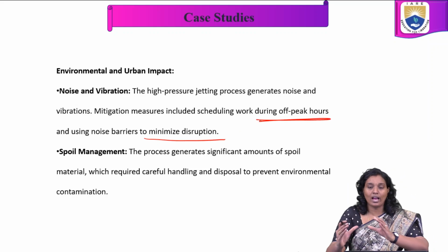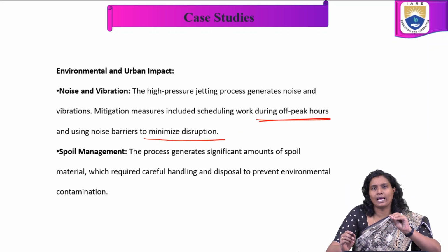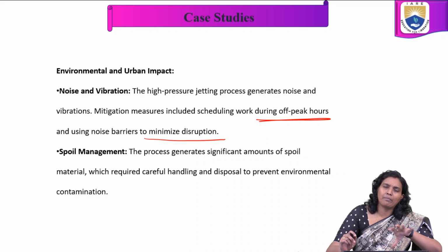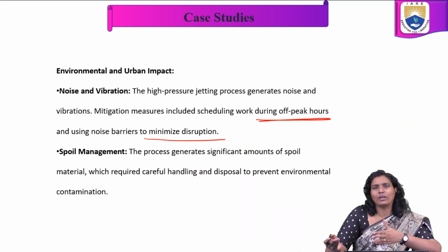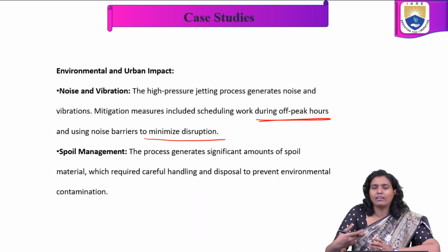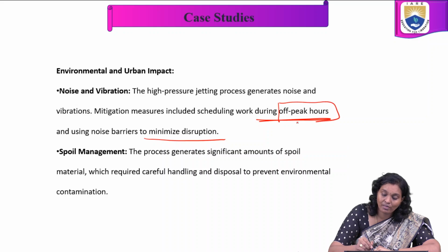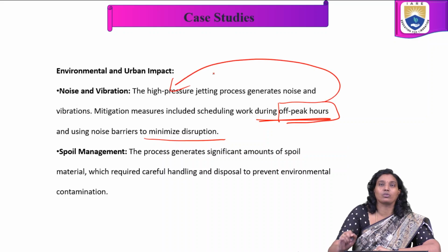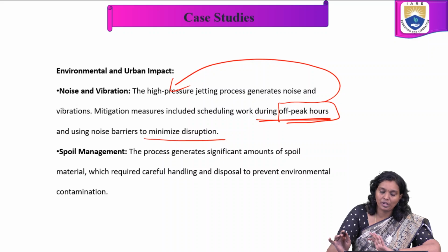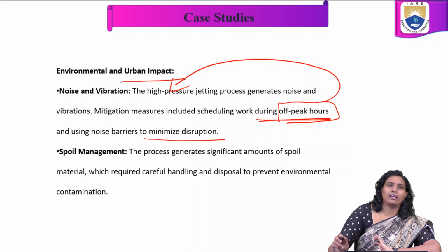Because of the urbanization and so many nearby works and disturbances, whenever we are doing this high pressure jet grouting, we have to choose the hours carefully, and also use noise barriers to minimize these kinds of disturbances because of the urban impact.